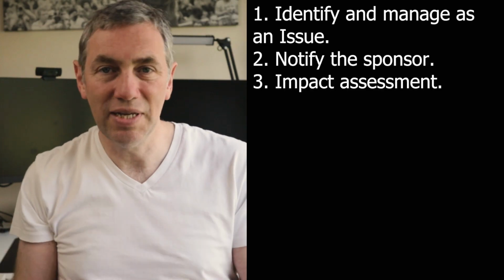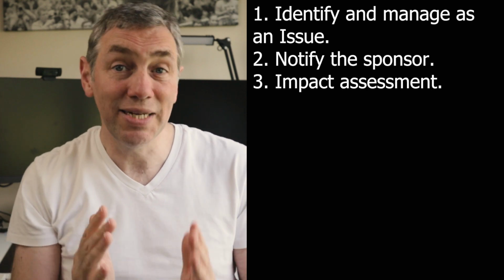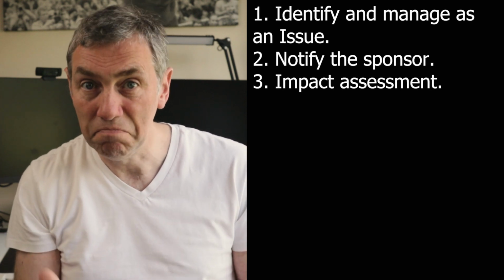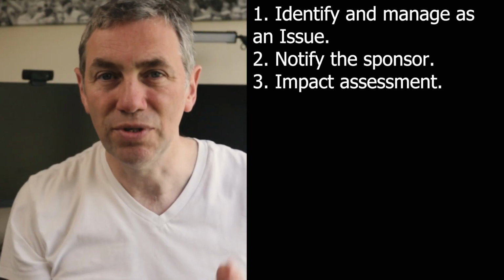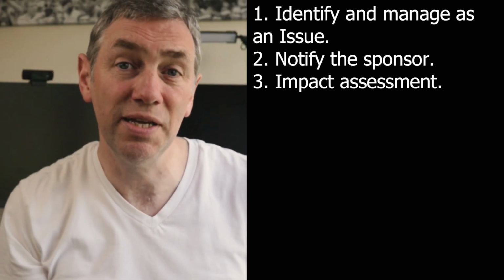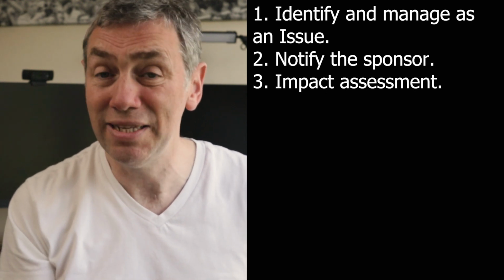Whilst you're applying your actions to resolve the issue, start looking at the impact. In this example, your project will be late. That's certainly not good news, but how bad it is will be determined by the impact it has. Does this delay mean that some critical product, tool, or process will be late getting into the organization's hands? Is that an inconvenience or is it catastrophic? For example, does this mean that higher profitability will be delayed? Or does it mean that your organization is now violating the law?